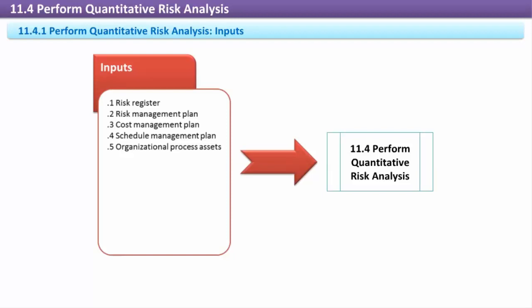Risk Management Plan. The risk management plan is a component of the project management plan. It details and defines the risk management activities for the project. The plan establishes the risk methodology, risk roles and responsibilities, risk categories, probability and impact scales, risk tolerances, frequencies of risk management activities and reporting, and the budget and schedule for risk management activities.